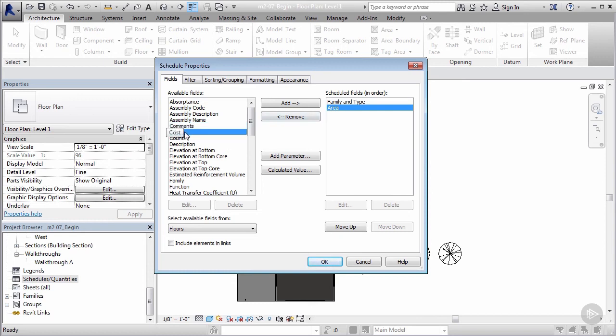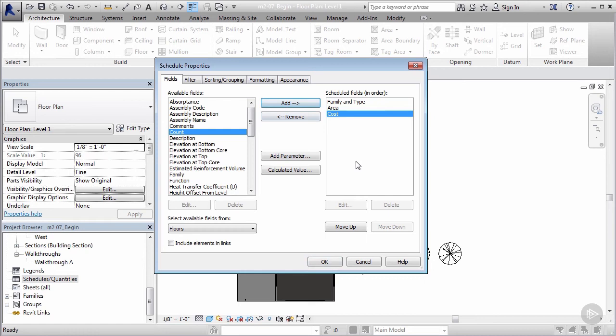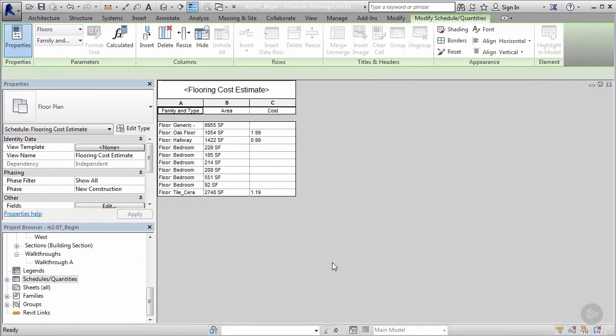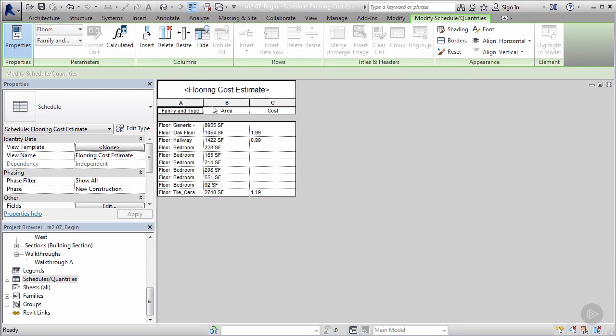So now we know the type, the area, and I want to know the cost—the unit cost per floor—so I'm gonna go ahead and add that as well. So now we have three really important parameters. I'm gonna say okay and voila, we've just created a really cool little sheet.